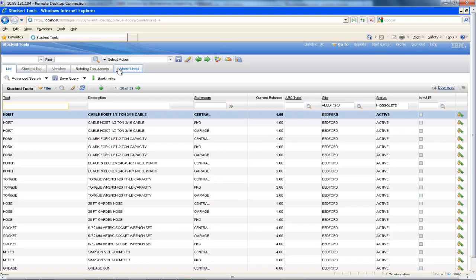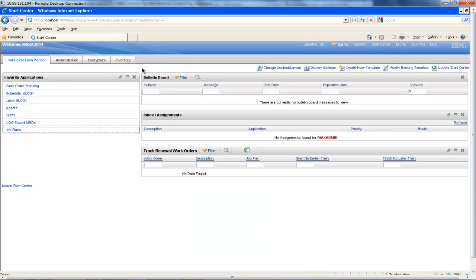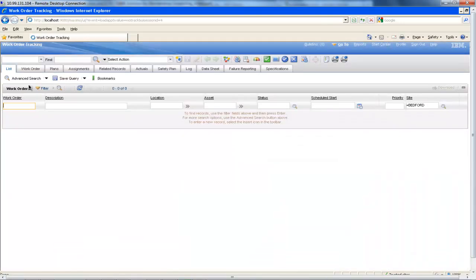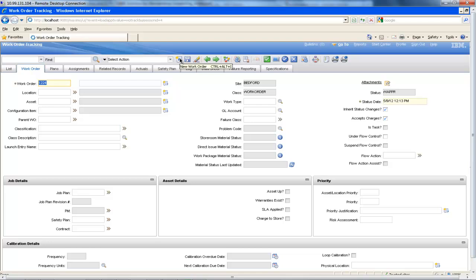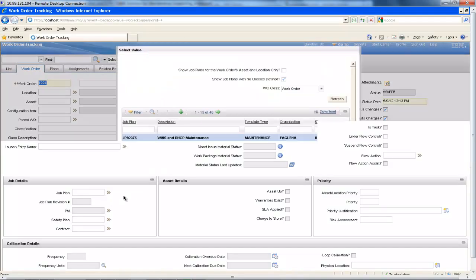Now that I have shown you some examples of the resource information that is stored in the system, we will now go on to create a new work order where we will need to allocate required resources to perform the tasks. To do this, I will go to the work order tracking application and click on the new work order icon. The maintenance work that I need to schedule in this instance is for the renewal of an area of track, and we can create this work order using an existing job plan that is already contained within the system, which includes details of all of the tasks and resource requirements for the work order to be completed.